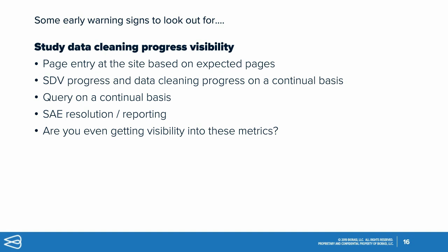Yeah, I think all of these things are incredibly important, and I found personally in my experience that queries can be one of the things that is most simple to address and deal with in real time, even by picking up a telephone. They don't need to be batched and wait for a site visit. Sites can actually pick up the phone and address a lot of the queries, but waiting until the end can have such a tremendous adverse effect on the timelines and getting the database locked, if even locked, because if you can't resolve the queries, now you're stuck with some unclean data that becomes problematic when you get in front of the FDA or the EMA.